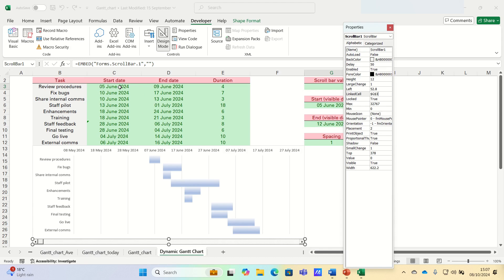However, since we want to show 7 days, or a week at a time in our chart, we deduct 7 to give 34 as our max value. So 41 minus 7 gives us 34.